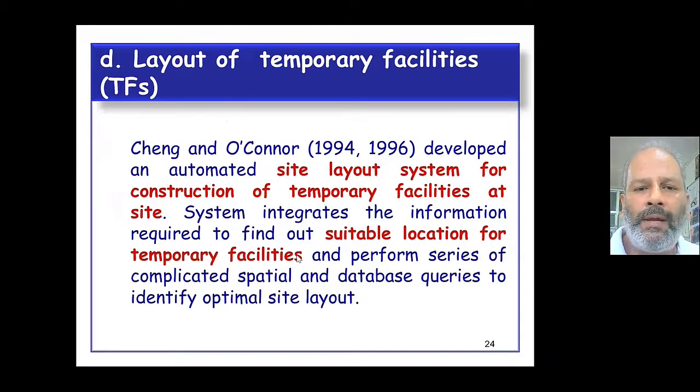Then layout of temporary facilities. Again, the site layout system for construction of temporary facilities at site is governed by so many factors, in which GIS is helpful. This GIS-based system integrates information required to find out suitable locations for temporary facilities, depending upon the requirement, when that facility has to be located and when that particular facility has to be dismantled.